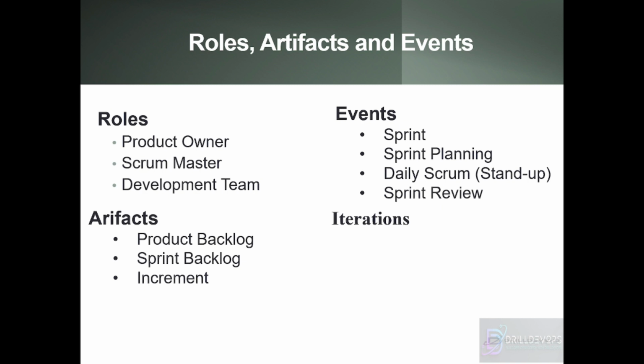Okay, Monday to alternate Monday, or it could be 3 weeks, Monday to double alternate Mondays. So sprint planning could go from a minimum of 2 weeks to 4 weeks. There is no restriction as such, but the ideal would be 2 weeks. That is a very good ideal time.